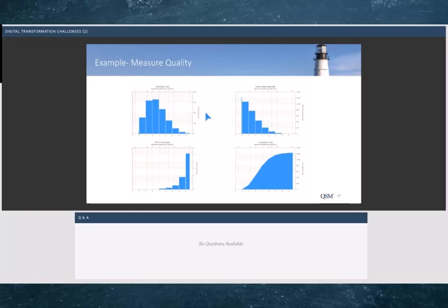Here we're looking at the defect rate, which is the number of defects per month. And you can see we gradually ramp up. We're starting to see more defects as we get further into development. And as we get more towards delivery, you can see the ramp down of defects. Defects remaining, you can see we start off high, and then as we get closer to delivery, we're having less and less. We've got the mean time to defect, which I mentioned earlier, which was about a day and a half on that previous release estimate.